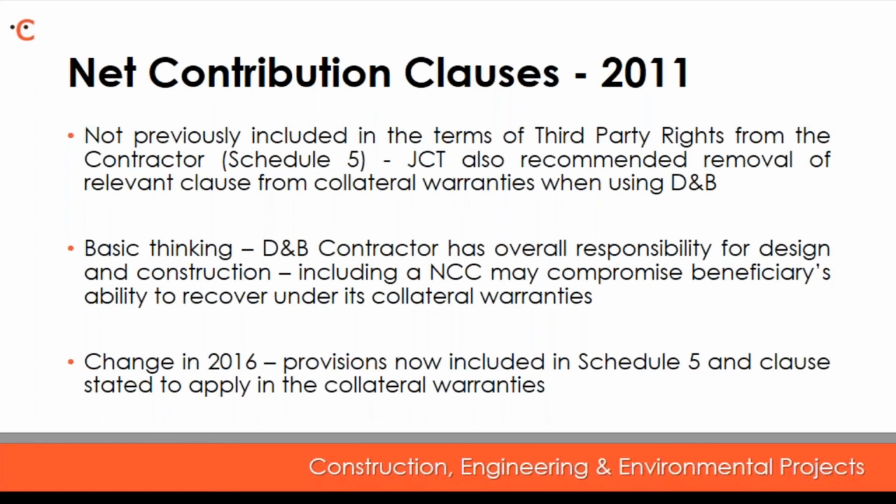Why is that? Well, effectively the consultant will rely on the contractor being liable for the works as a whole, which is the general intention of the D&B contract, while the contractor will rely on the assumption that's set out within the contract that the consultant has actually paid out. And what you get is a conflict between those two positions and essentially a bit of finger pointing that leaves you with an unclear position, which is not desirable to beneficiaries.